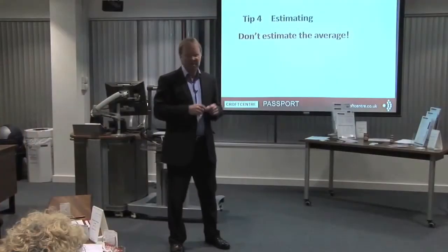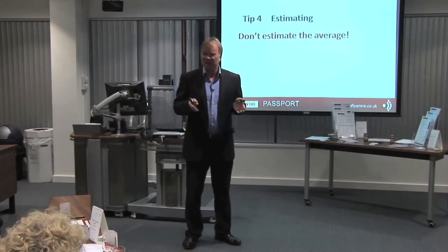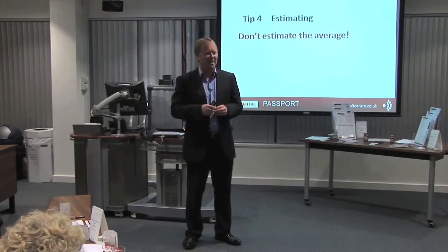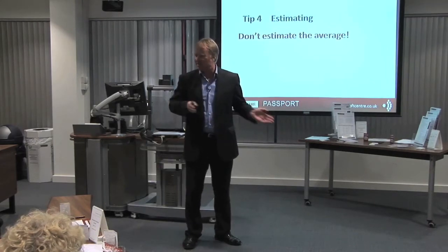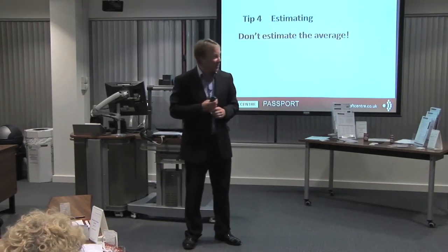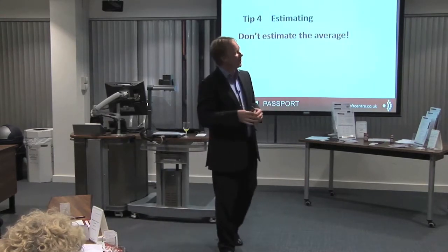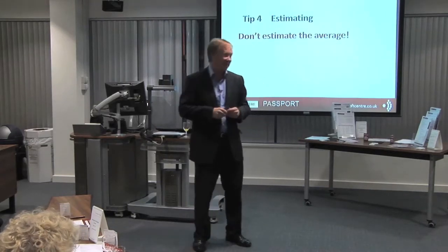We have a process. When someone says, how long does it take? You could quote the average. What's wrong with quoting the average, by the way? It could be more or less. And what's the probability that I'll be late? If I say, I'll see you in Birmingham in 3 hours, what's the probability I'll be late? Average. It's going to be 50%, isn't it? And so I know it averages out, and some are more and some are less. But the problem with projects is I can't go, sorry, your project was late, Eric, but Simon's was early.